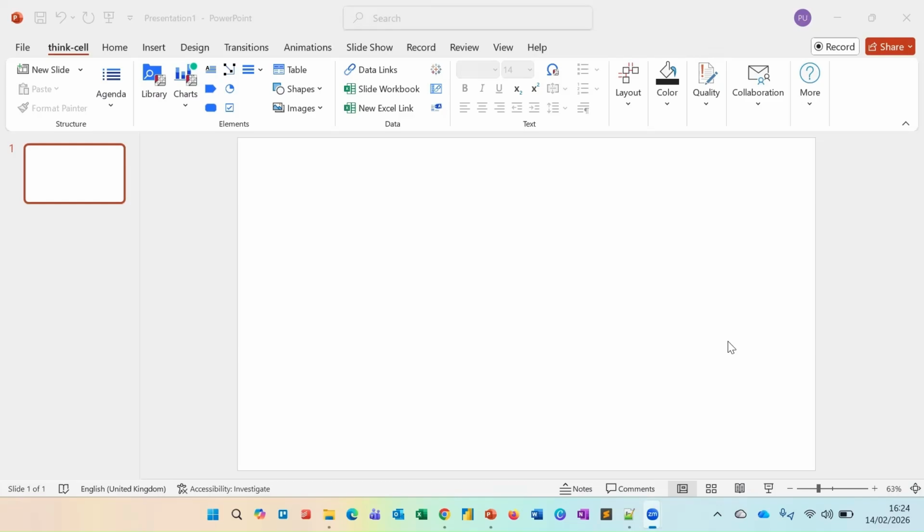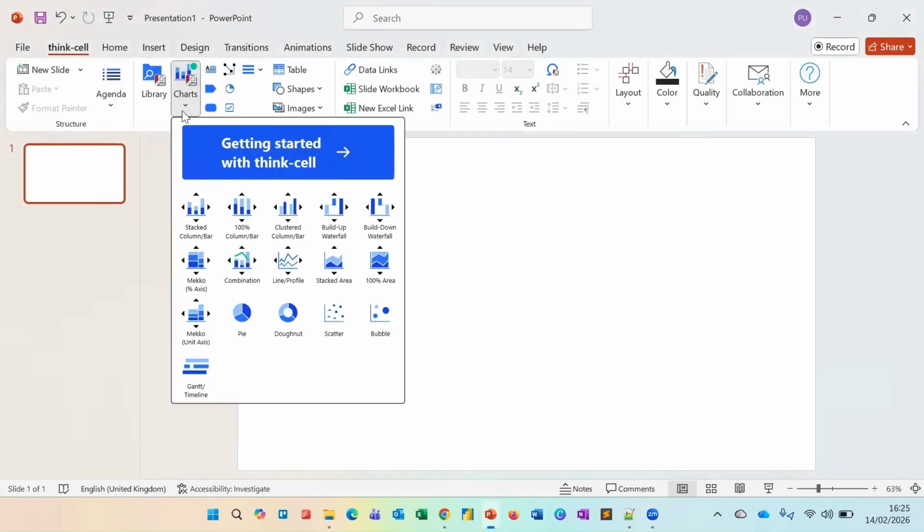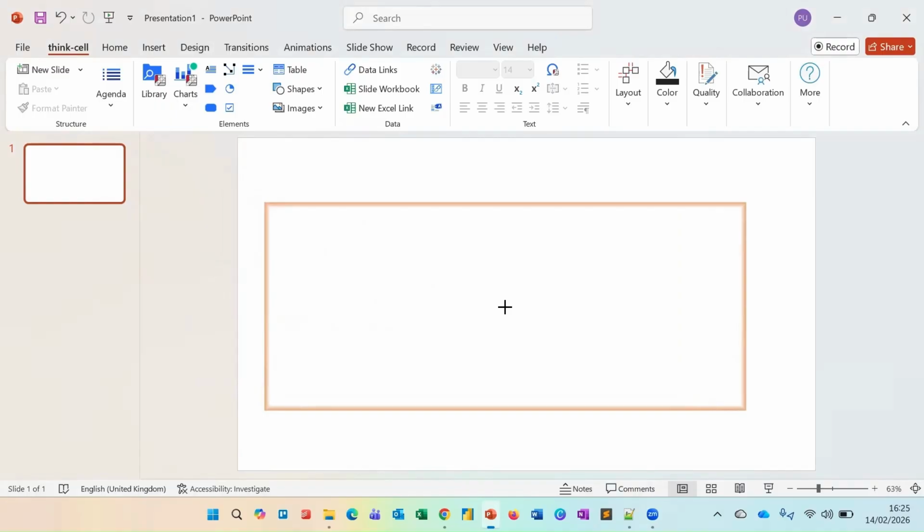Hello, you're welcome. In this video, we are going to be looking at how you can use Gantt chart in Think-Cell. So Gantt chart is a chart that comes in handy when you want to use Think-Cell to plan and schedule your project. So to effectively add this, we'll come to our elements, and under chart, we select this Gantt. Then we place it on our slide.